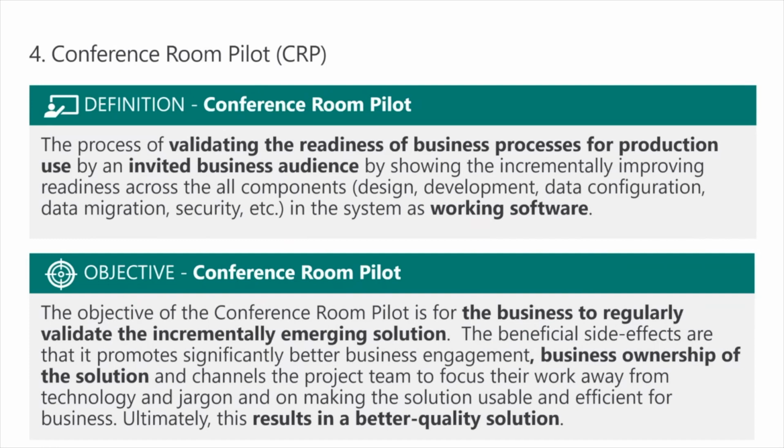But the idea is that you're getting your invited business audience to say, yeah, you're on the right track. That looks like it will work for us in production use, right? Now, the business is not signing their life away, right? This does not remove the need for user acceptance testing or SAT or whatever other test cycles you might have, where we're actually going through with your hands on the system and validating it. But what it does is it makes sure that what you're delivering is not going to be a surprise for